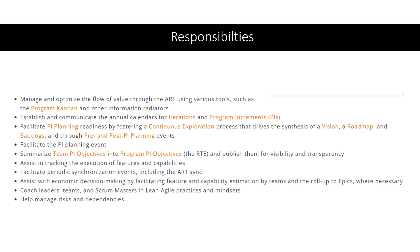They facilitate the entire PI planning event, summarize team PI objectives and program PI objectives, and publish them for visibility and transparency. They also help in tracking and execution of features and capabilities, assisting the product management team. They facilitate periodic synchronization events including ART sync. They assist with economic decision-making by facilitating feature and capability estimation by teams and roll up to epics where necessary.